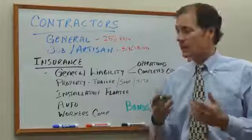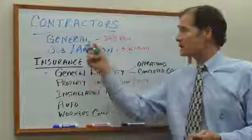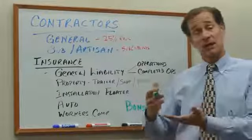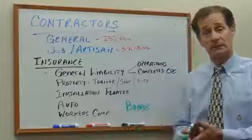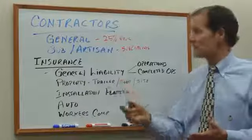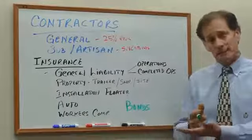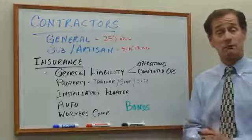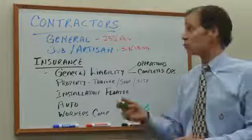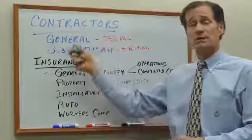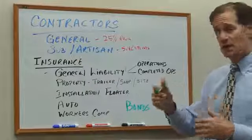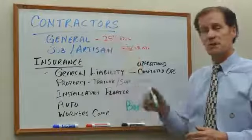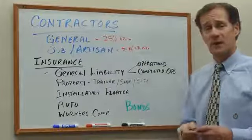Why is that? It all comes down to control. A general contractor is relying on other companies to get a lot of the work done on a given job site, and because of that lessening of control, the risk of something going wrong is greater. There are ways that we can control that additional cost that I'll get to at the very end, but that is, broadly speaking, how we break down contractors.